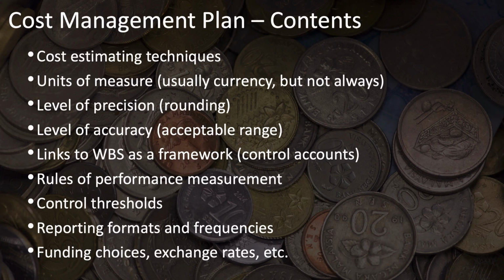Your cost management reports should be defined here ahead of time, the formats you'll use and how frequently you'll send them out. You should also include information about your funding choices. Where will your funding come from? How will you account for any fluctuations in exchange rates between countries' currencies? And what will be your procedure for recording project costs?